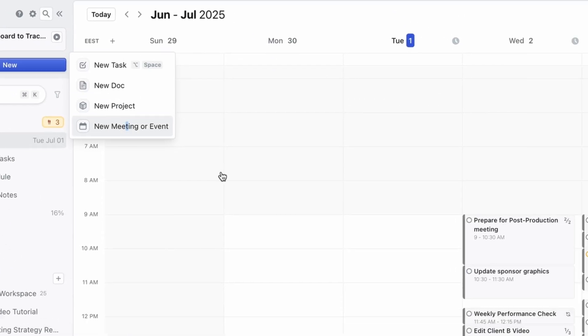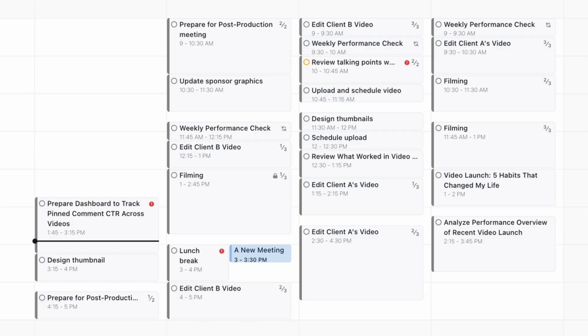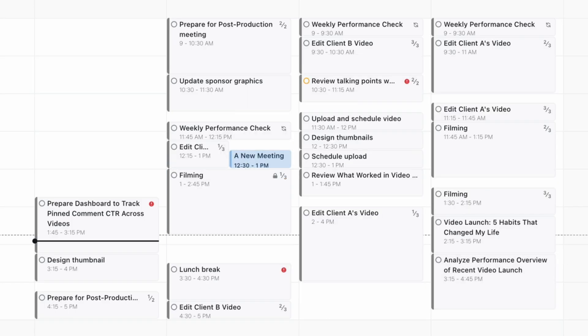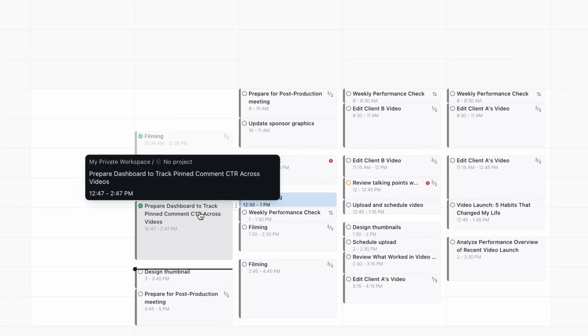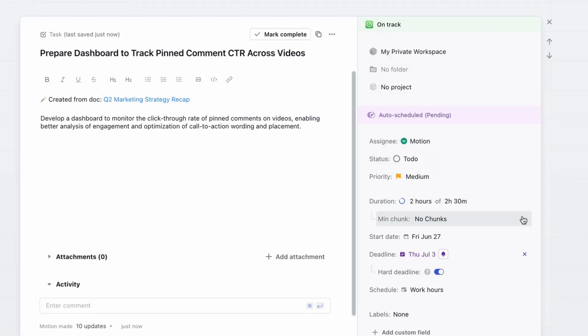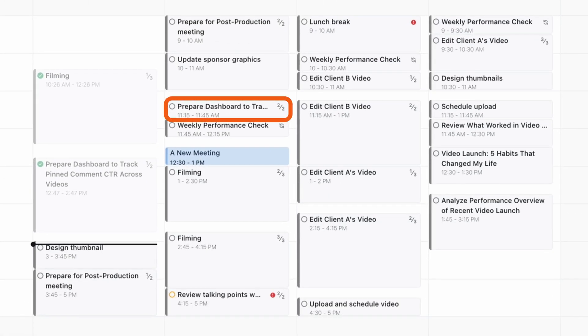Let's say a new meeting overlaps with a task — Motion will shuffle the schedule again to protect my most important deadlines. And if I mark a task incomplete, Motion finds a new slot so nothing gets dropped. This is real-time time management.